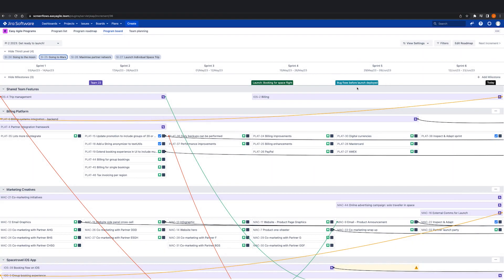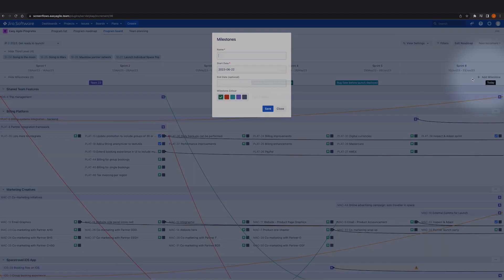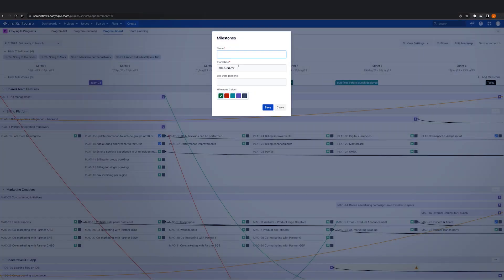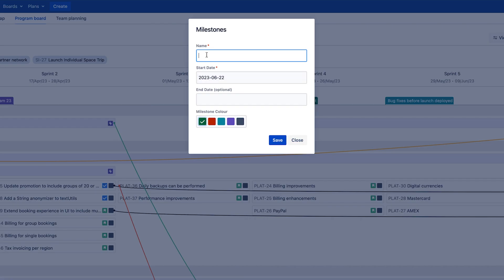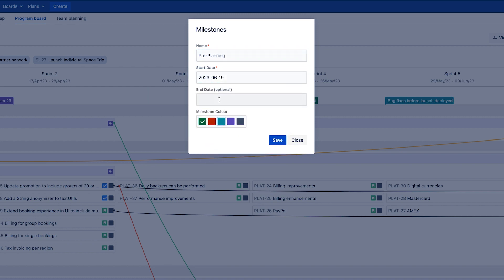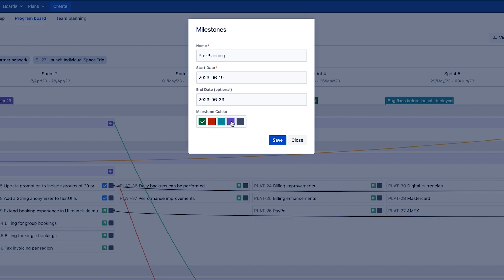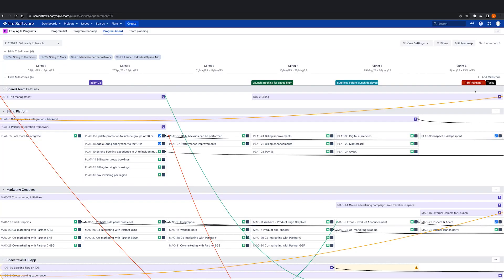To create a new milestone on the program board or program roadmap view, click the plus milestone button. Name your milestone, set a start date and an end date if you wish, then select a milestone color and hit save.